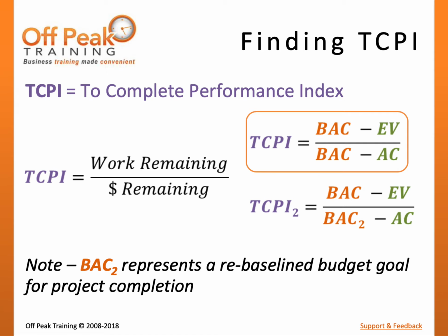Be careful, as other textbooks, including the PMBOK guide, use an acronym EAC to represent this modified baseline. This can be confusing, as this is not the same EAC we calculated earlier in this module. For that reason, it is recommended that you remember the notation used on this slide. The formula that we circled on this slide should be used for TCPI in most scenarios and unless otherwise told. Only use the alternative formula if you are given an alternative rebaseline budget.